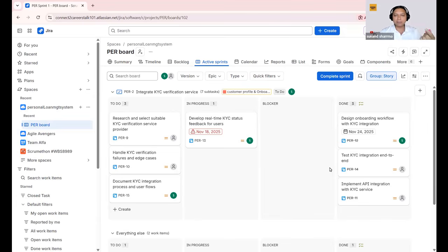This can help the Scrum Master, the release train engineer, product management, or stakeholders understand the end-to-end flow of work across the ART. Okay. So the idea is not to replace every team's individual board. Teams can continue using their own boards, while an additional cross-team board provides a high-level overview of the delivery across the ART. This is particularly useful during PI planning, PI execution, dependency management, and ART-level reporting, where you need visibility across multiple teams.